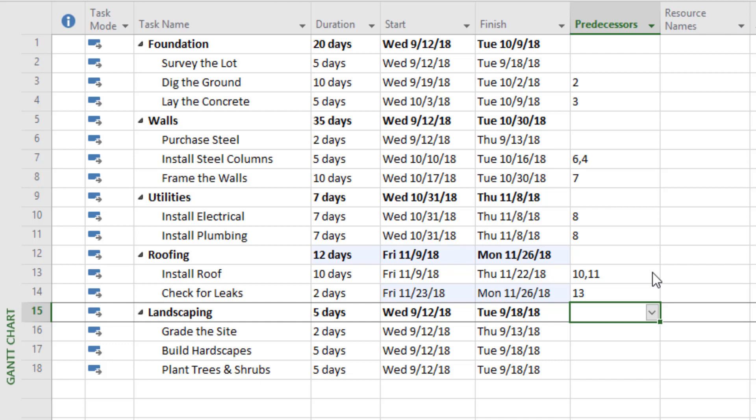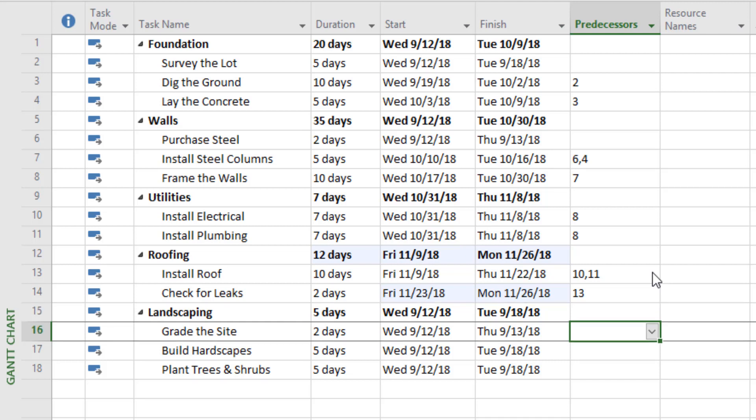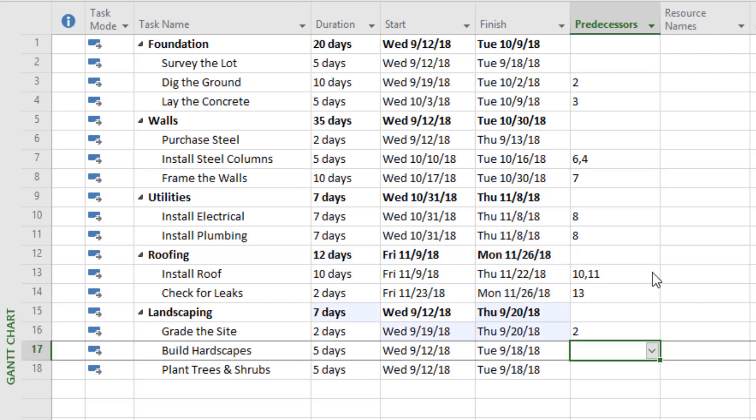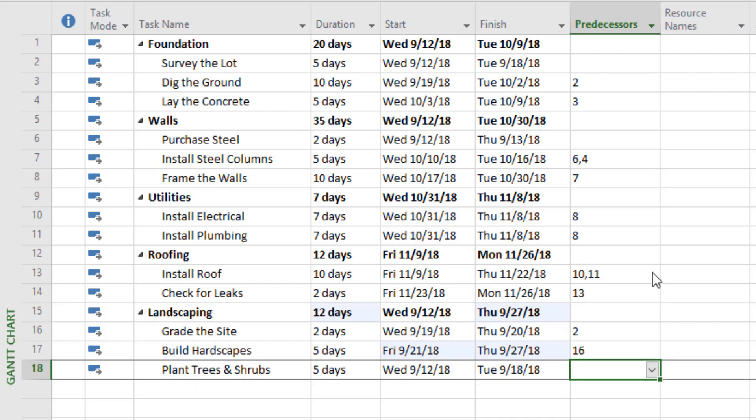For landscaping: grading the site can be done right after we survey the lot — it doesn't have to wait for framing the walls, utilities, or roofing. With building the hardscapes and planting the trees, we can't do those until we've graded the site, so their predecessor is number sixteen.